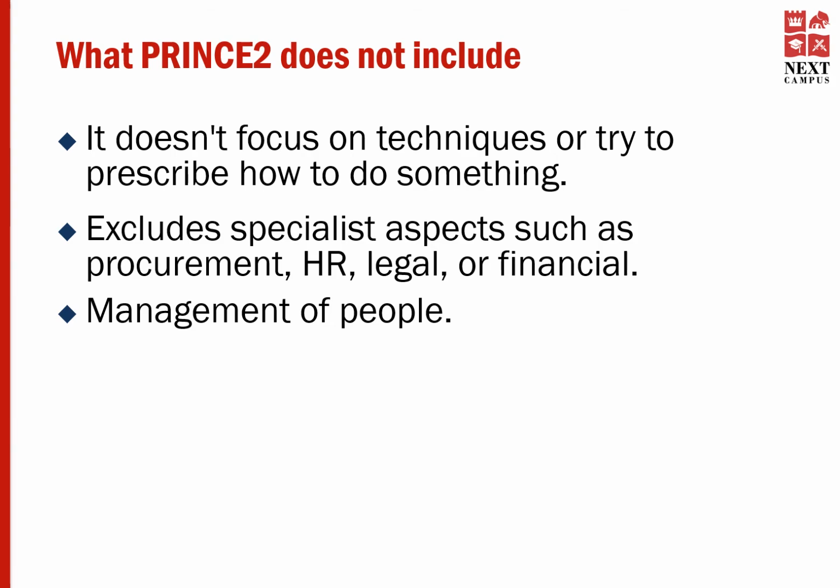Now let's have a look at what Prince2 does not include. It's important to know what it doesn't include. It doesn't focus on techniques or try to prescribe how to do something. Prince2 suggests that you should do an investment appraisal as part of your business case, but there are no specific instructions as to how this could be done. This is because every organization will tackle this in a different way. So the important thing is that it is done. How you manage it is up to you and your organization.